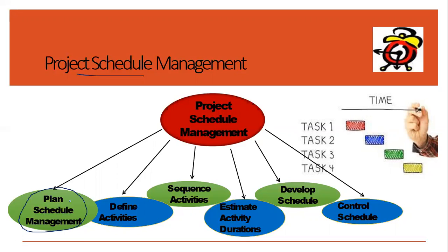Once the planning is completed, we come to defining the activities. What we are trying to do here is create those activities, right from requirement gathering to design, to build or construction, then testing and deployment. All these activities will be part of define activities. Now this is just a primary step. There are multiple steps to make sure it is finalized.